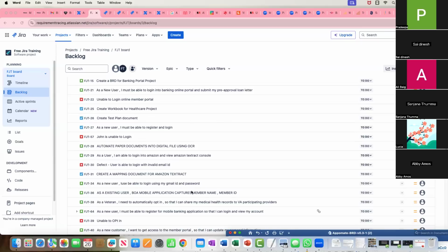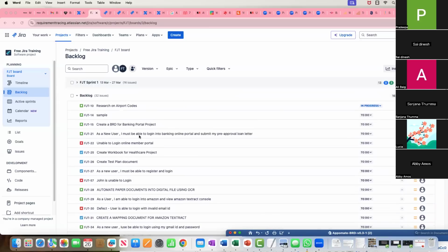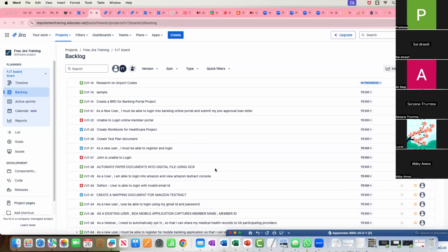Like this, we will pick up to our capacity. For example, we have limited capacity, right? In 4 week sprints, the maximum we can take is like 13 points or maximum is 15 points. That's all. We don't go beyond that. So if this is an 8-pointer and then this is another 5-pointer, I stop with 2 user stories. I'm not going above that. You can say that my story points are 13 and above, so I'm not going to pick up anything. I'm done.